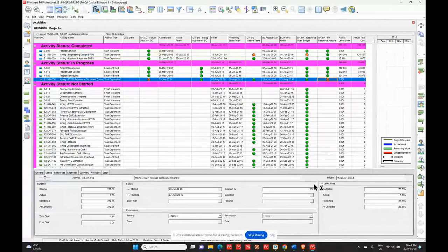This one is another one that, depending on the circumstances that you're dealing with, it's always valuable, in some cases more so than others. And I'll give you an example. I've been at 2 different client sites where somebody wasn't clear how they should be updating activities in P6. And as a result, the actuals were not calculating. Unfortunately, we found that out after about 300 activities had been updated incorrectly. Now, this will tell you right away. So another check that you can check.